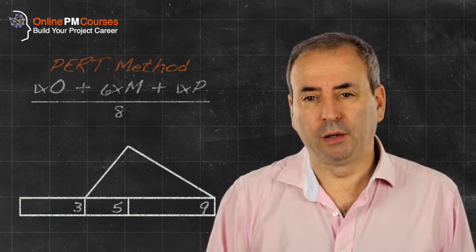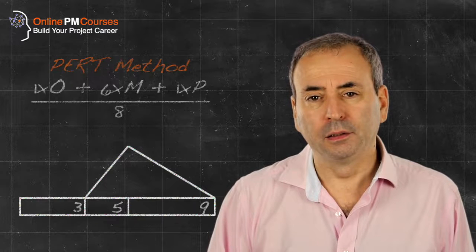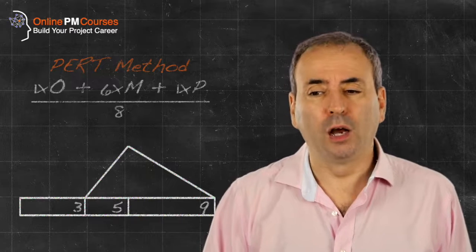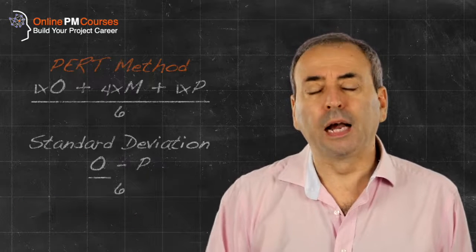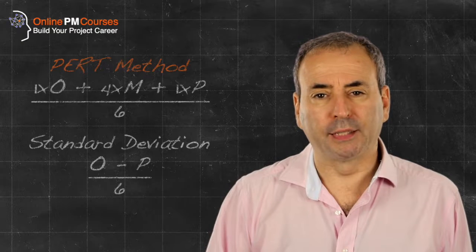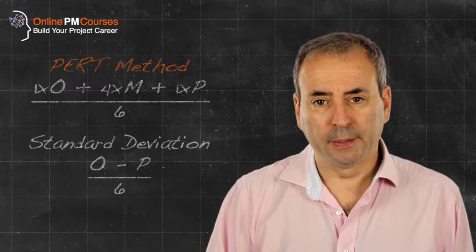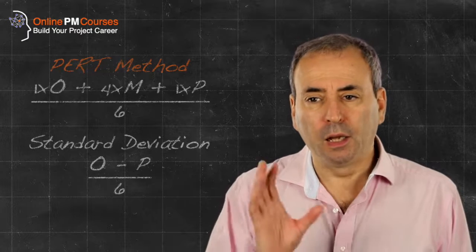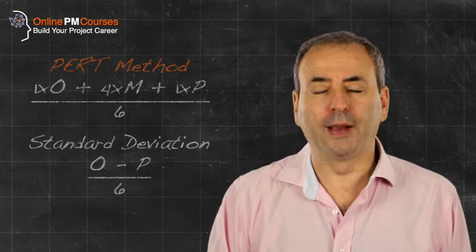We can also calculate the standard deviation to get some idea of the spread of likelihoods around our average. The way we calculate that is we subtract the optimistic estimate from the pessimistic estimate, then divide the answer by six. That gives us a plus or minus on our average.